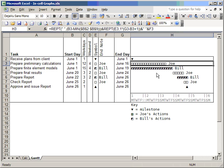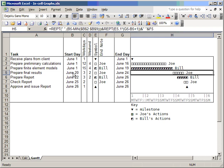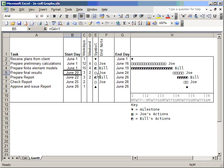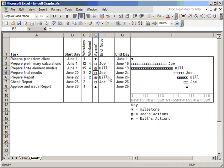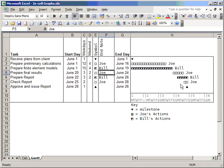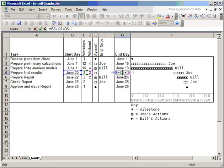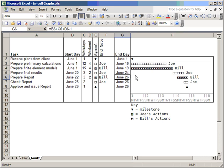Let's take a little bit more look at the kind of inputs that we have to this equation. We have a start date, we have a number of work days for the duration of an activity, and if it's spanning a weekend we might just add the weekend time in as well, because that extends the duration but doesn't necessarily affect the cost of an activity if people aren't working weekends. We can choose a symbol that we want to display in our Gantt chart, and we can choose an end note. In this case I've just tagged on the names of the people that are doing the actual activity. And the end date is calculated very simply: start date, number of work days, number of weekend days, and there we go.